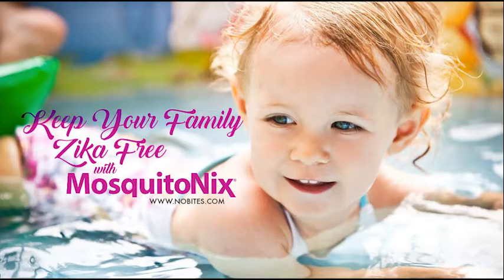I think that's one of the most important things, especially for the piece of it that I'm working on. When you initially come in to meet with Mark, if you have some ideas of what you want the house to look like, if you have pictures of cabinets that you like, that helps with establishing the budget. Because if we don't, and then we start saying, okay, let's go shopping for cabinets, and you've got a $20,000 cabinet budget, and the cabinets you show me are going to be $50,000, then we've got a problem. Because when I show you what $20,000 worth of cabinets looks like, that could be an issue. So any kind of information you can bring, whether it's torn out of a magazine, whatever, photos online, the more information you can bring to Mark, the better.